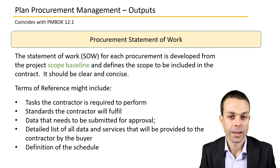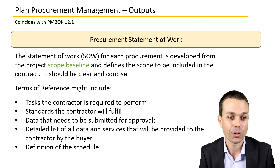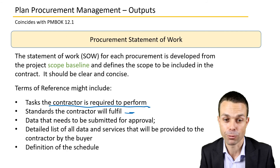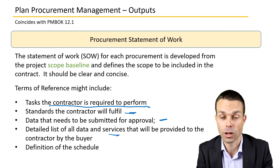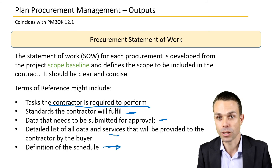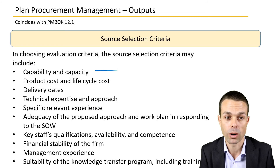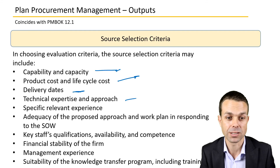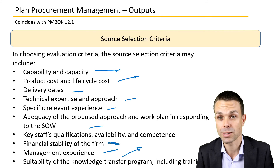The procurement statement of work is a key output developed from the project scope baseline, defining the scope to be included in the contract. Terms of reference in a procurement statement of work include the tasks the contractor is required to perform, the standards they will fulfill, data that needs to be submitted for approval, a detailed list of all data and services to be provided throughout or at the end of the contract, and a definition of the schedule they will work to. Source selection criteria — another key output — can include capability or capacity, product cost and life cycle cost, delivery dates, technical expertise, relevant experience, qualifications, financial stability of the firm, management experience, and suitability of knowledge transfer.